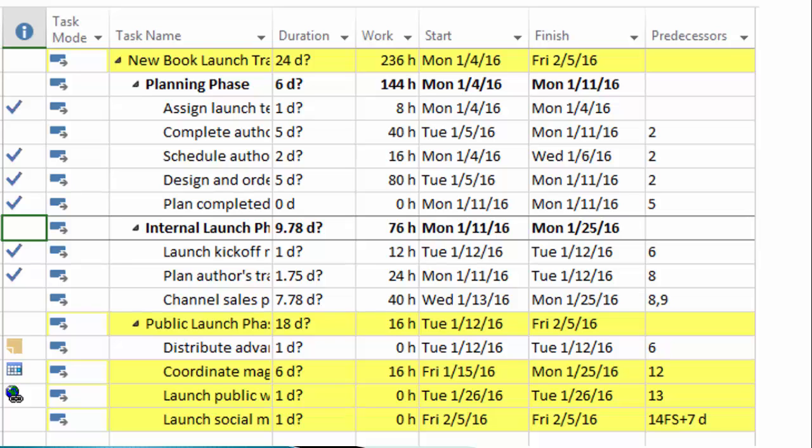Notice that when we switched to the Detail Gantt view, the formatting we did to the milestone task and the Gantt chart is gone. Gone, but not lost. When you switch back to the regular Gantt chart view, you will find that all the formatting is preserved. When you return to the detailed Gantt view, it will appear as above unless we make other changes.